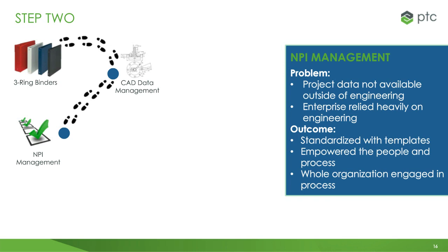We standardized with project templates. So even though we had PDMLink, we were only using the ProjectLink part of PDMLink. We updated and created additional templates as our product lines grew. Currently, we manage 19 active templates over 9 distinctly different categories, including product realization, so new product categories, tooling, manufacturing, and even IT. There are currently over 130 new product projects running. Over half of those projects have new technology. We manage all these projects with 4 project managers.